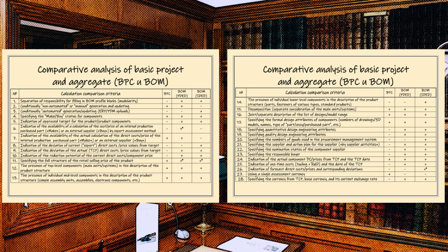On the other hand, with separate files, sometimes there is a problem with unification, since a cost engineer may turn out to be, for example, an individualist anarchist and add a couple of columns by changing a single structure, which will cause a problem when consolidating information from the BOM for different systems when forming a consolidated BOM.